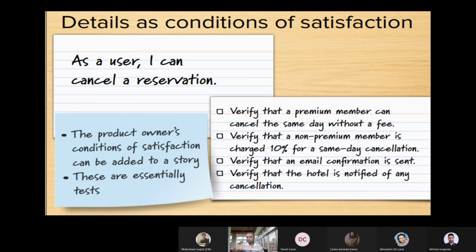When we say verify, he is talking about acceptance tests. When I can accept this user story, when you give a sprint demo or a sprint review or a demo of your particular story, at that time whether all these checkboxes are checked or not, from a feature perspective. If from a feature perspective all those things are checked, then the product owner can say, okay, go, done. When he says done, then it is accepted and it will contribute to the sprint completion or not.